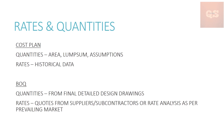As a cost consultant you will already have historical data — for example, for a certain area of a room, the number of light fittings will be approximately this much. For rates too, they will have historical data from other similar residential projects done in the same country or area, and those rates can be used for this project to arrive at an estimated budget. As the stages move forward and more quantities become available, you keep updating the cost plan, and accordingly the total budget keeps changing.